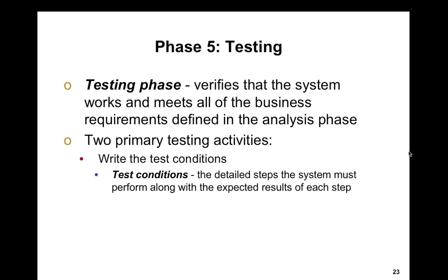So testing, believe it or not, always ends up being last in the waterfall model, which is why the waterfall model isn't really as good as some of the other ones. They wait two and a half years or so, or a year, and they're almost ready, they have it developed, and then they test it. Well, that's kind of late, actually. Because if there's a fundamental problem with the requirements or with the logic of the system, and you waited until it was all implemented to be tested, you end up with harder to fix problems than if you start right from the planning stage and actually start your testing.